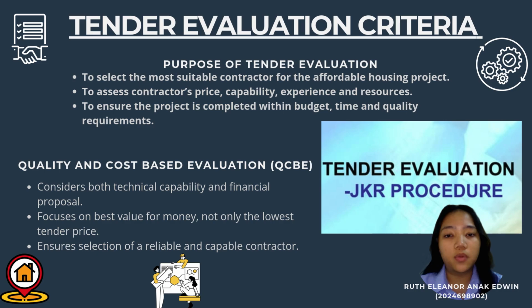For this project, we propose using the Quality and Cost-Based Evaluation or QCBE method. This method considers both the contractor technical capability and financial proposal, allowing HDC Sarawak to recommend a contractor that offers the best value for money rather than simply the lowest tender price.